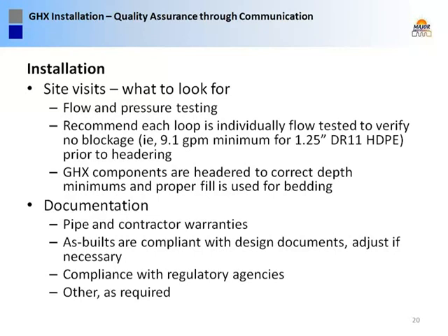Finally, when this thing gets towards the end, we want proper documentation. We want to see all the warranties and whatnot. Of course, a lot of this was in your submittal set, but your as-builts, you've got to make sure they're compliant, not only with your design documents, but if you have to adjust them for whatever reason, that has to be updated. And of course, compliance with any regulatory agencies involved. If any of you guys are from California, you'll know what regulatory means.